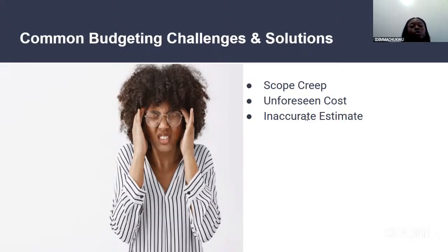And then in the case where you underestimated, you told somebody that what they need to actually build a house is say 5 million. And then during the execution phase, you're coming back to say, oh, you forgot to add this or you forgot to add that. That does not make you an actual project manager. So how do you resolve this as a project manager? The best technique to use is the bottom-up estimation technique, because it breaks it down and takes into account the little costs that you can notice during the course of your execution.